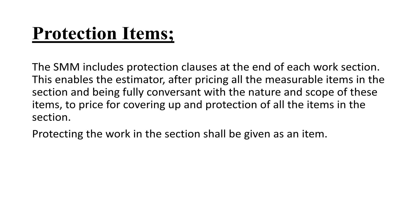The SMM states that an estimator should be able to add an item for protection after measuring everything that is measurable, so as to protect all the items in the section. Just in case the price goes up, to cover that increase, we need a protection item. It is just like an insurance or a contingency. That item is called a protection item. It is usually added to every section so that, just in case the cost changes, everything will still work out and the project will not stop.